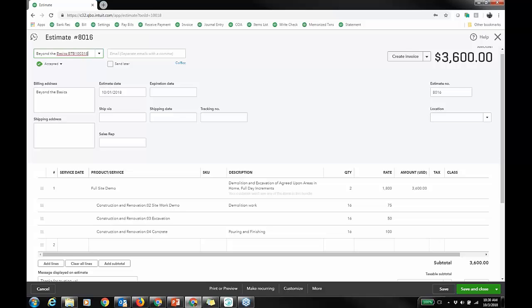Right? So that's the Stacy Kildall approach, and that's what I'm going to be using today for a budget to actual workaround. Again, if you have tons of projects a week, then I think you're better served with a third party because there's some data entry to consider and some time that it's going to take. It may be 45 minutes, an hour just to set up the budget for the job. But if you just have a few projects a week, a handful of them, and you've got some time to enter this, then this is great. This will work. It's still viable. There are still clients, like smaller contractors, that are doing this without a third party.